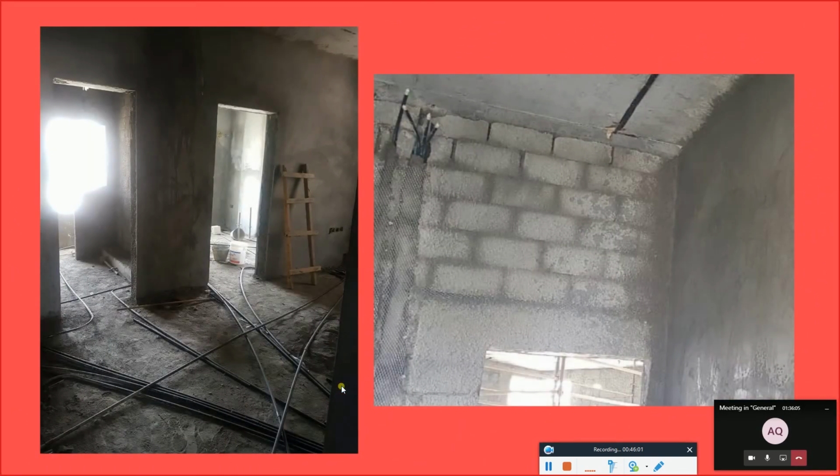Okay, so after we finish the concrete work, or after we finish the concrete wall, normally we'll go for plastering before we start any type of extra work, like doing the tiles or painting as well. Okay, so first we'll go for plastering.